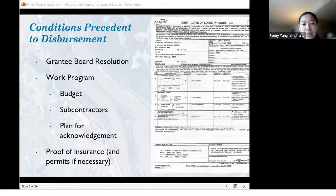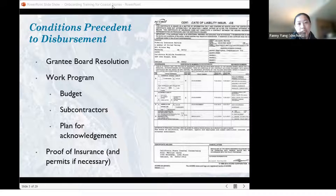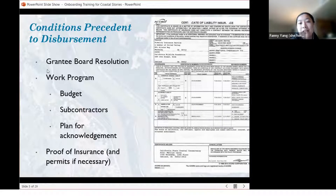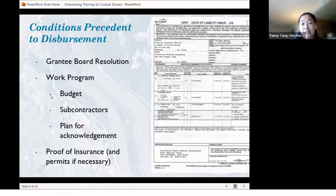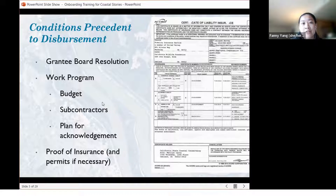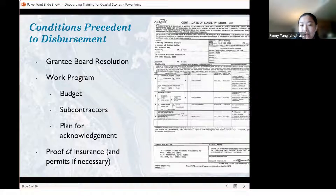Then you have the work program. I'll dive a little bit deeper into this later, but at a high level, your work program will contain your budget, a list of subcontractors you'll be working with for your project, and a plan for acknowledging the Conservancy's funding.